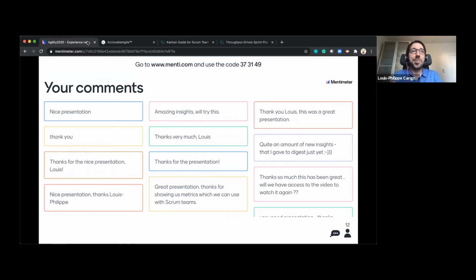And at the same time, it reassures them that there's no more bullshit about all this stuff. This is how we are operating. And at retrospectives, we can talk about those numbers if they make sense or not, because maybe throughput is going down, and maybe that's just normal because the last items that we've completed were big chunks of work. So their cycle time was just higher.